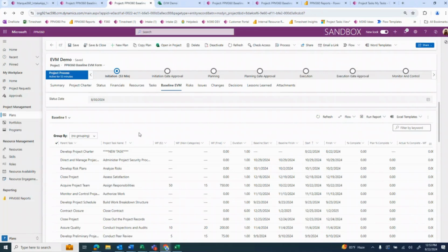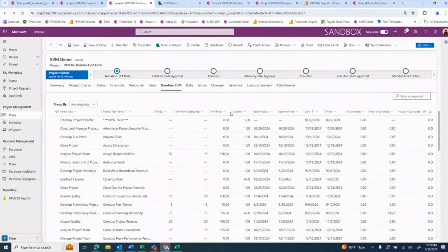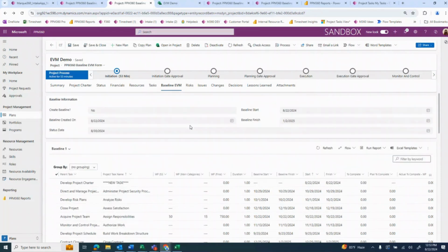So this view is completely customizable, so you can add as much as you want. In this case here, this was a mock-up for a customer that needed more calculated fields here. But if it was me personally, the way I run my schedules, these are very useful to have, but I would definitely want to add effort completed, because resources do tend to go over hours and you want some kind of alert for that. We could even go as far as, using some coding for this, to apply a highlighted red cell anywhere where it did go over, which would act essentially as a variance. So planned effort versus actual effort. And then it would highlight red or send a notification for anyone that did go over.